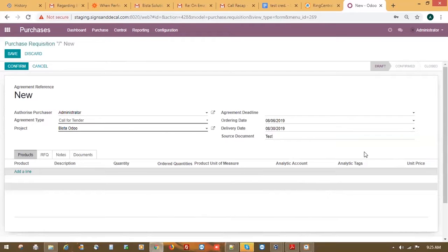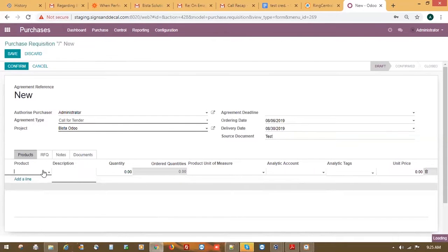There is some schedule linked to your projects. Like you guys are also delivering to your customers, to deliver them in a particular time, you actually require the raw material by that time to process it. So that's the reason you need to mention it, but it's not a mandatory field. You can keep it blank as well. Okay.